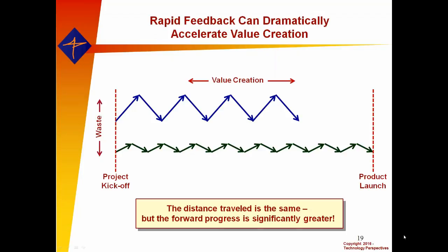By using more frequent stand-up meetings, we actually can straighten that line out. We can increase the amount of vector that's pointing towards the end. Literally, at the same speed, we have a higher velocity. And what I've done in some of my time studies with companies that have been doing this for a number of years, we've actually found 10 to 20% improvement in schedule just by virtue of using the stand-up meeting project board format without any of the other tools. Just the fact that we are now feeding back more quickly, resolving issues in more of a just-in-time way.